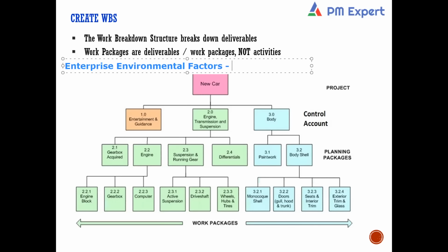Now, you have a work breakdown structure in front of you. Can government regulation impact the work breakdown structure? Yes. For example, generally when you build a new model of a car, is there any scope of work or component which is not highlighted here? There will be some unit of work that you need to do to fulfill the government compliances.